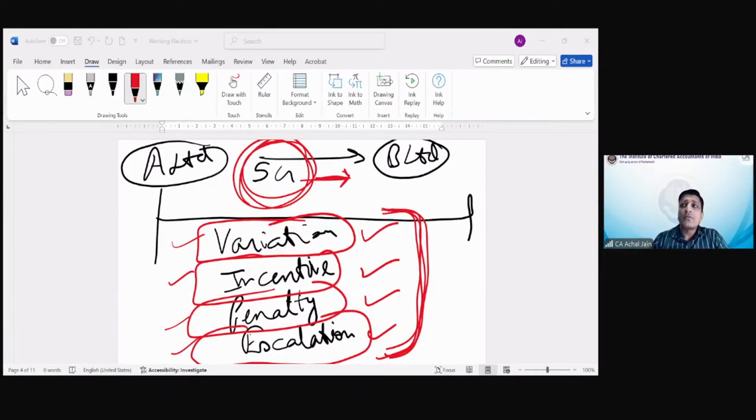Harshdeep is asking about the second point of the cost of a contract. I would like to keep it very, very simple, and let's not go by first point, second point, or third point. You just go by the understanding that any cost which is incurred in relation to the construction of the building or the construction of the asset, whatever that underlying asset is, you need to understand whether that cost is incurred in relation to that construction or not. If the answer is yes, you'll take it to the construction cost. Otherwise, not. So that's how you're required to consider it. Keep it very, very simple, and that's how you should approach the questions also. We'll discuss in the next session when we'll pick up some examples.